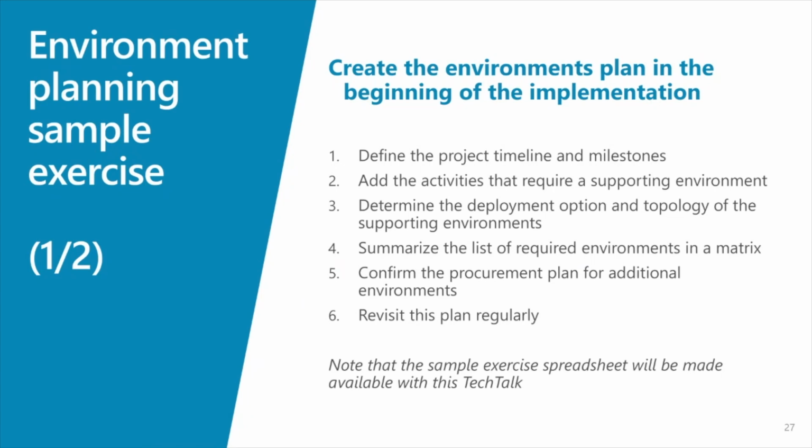At this point in time, we're going to pay particular attention to those activities that require a dedicated supporting environment, i.e., we might not be able to conduct multiple activities in the same environment at the same time. Based on those considerations, we're going to make yet another pass at this plan and determine some of the specifics for each of these environments. What specific purposes and intents these environments are going to be used for will help us determine the appropriate deployment option, topology, and other details.